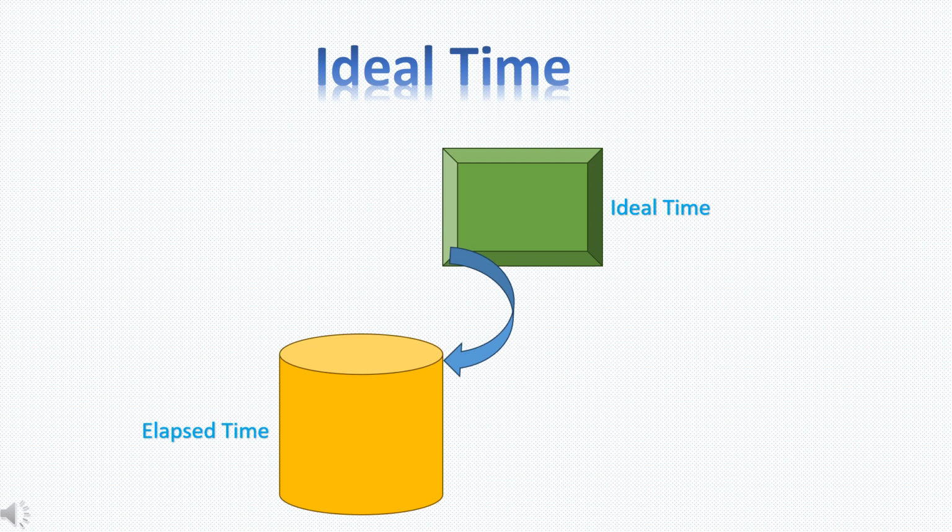Most teams will estimate user stories in the product backlog using story points, but then when they are doing their sprint planning and disaggregating the user stories into tasks, they transition to ideal time estimates. Then the ideal time estimates have to be converted to elapsed time, and this actually leads to very reliable predictions for the schedule of the sprint.